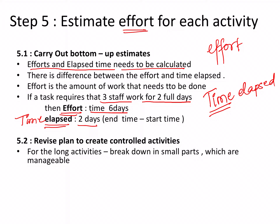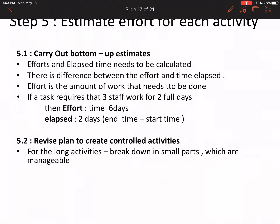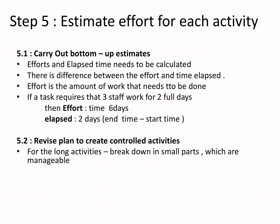Step 5.2: carry out bottom-up estimates and revise the plan to create controlled activities. If there is a huge project, it is very difficult to monitor and manage. It is better to break any big project down into modules or smaller manageable parts. You have to revise the plan to convert the big project into smaller parts so that you can manage the project properly.